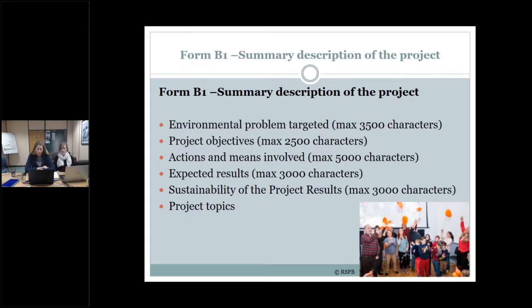So within the logical framework, you identify the environmental problem by creating a problem tree. The action and means need to be logically linked to the objectives and ultimately to the environmental problem you're trying to address. You can then convert your log frame tree, problem tree, into an objective tree to make sure that you are addressing each element of the problem. You will need to ensure that there are logical links between the cause, activity, and results, and that they're causally linked. So if you're interested in the logical framework approach, please contact us after the webinar, because we used to run training courses for log frame training.